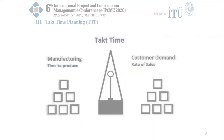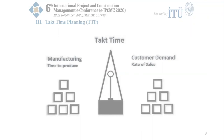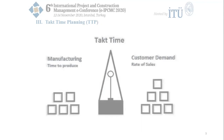Takt is originated from the Latin tactus, meaning touch or sense of touching. In Latin American countries like Peru, takt planning is referred to as activity trains. The German term takt is the translation of cadence or rhythm, used in lean philosophy to refer to beat at the demand rate. Unlike rhythm in music, takt has a predetermined repetition process with the same duration. To maintain flow and create a pull system, a constant takt time is determined for all workstations throughout the project. If this time interval is incorrectly set, a high takt time could cause many trades to have idle time, while a low takt time could cause overproduction.